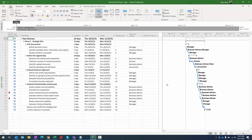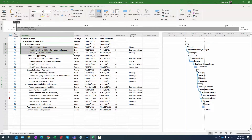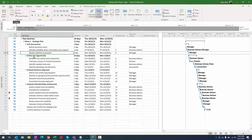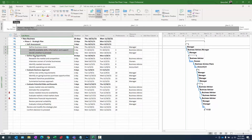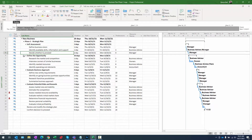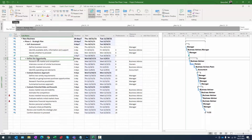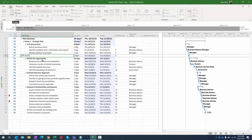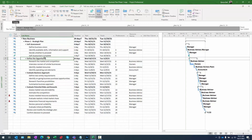Number one: let's create a milestone with zero duration. A lot of times we use them at Intrigent to denote the completion of a set of tasks, a stage, or a phase. For instance, for self-assessment, I'd like a milestone at the end to determine specifically when it's complete. So what I'm going to do is insert a task right above 'define the opportunity' — right click on row six, select insert, and call this 'self assessment complete'.